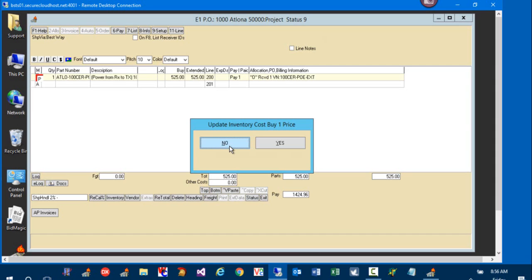Okay? The same thing, you guys are going to get the prompt. Control 4, okay? So you're ordering all those touch screens. Well, we're getting a 20% discount, $2,200. So we'll be able to see that bottom line discount now flow through to our cost on the estimate. Absolutely. So when we print that report, we'll actually see the deviation. Estimated cost versus actual cost.